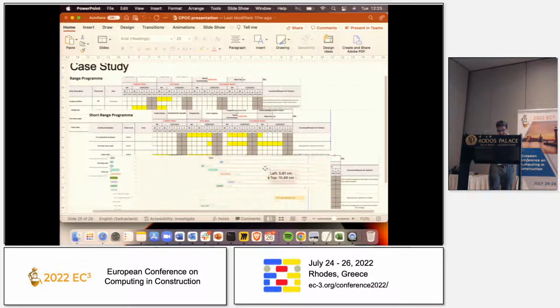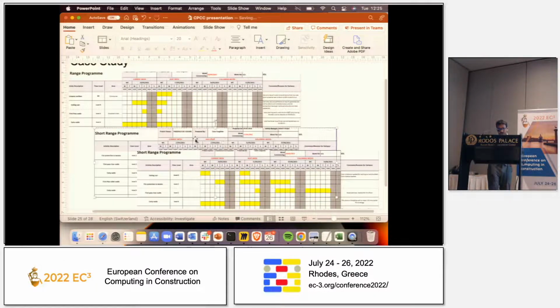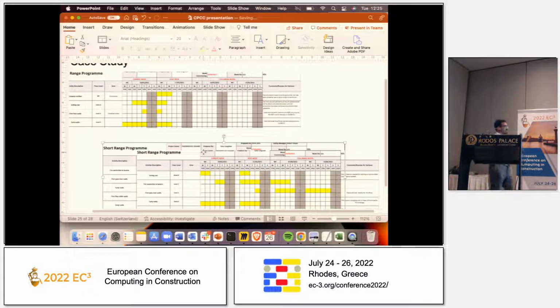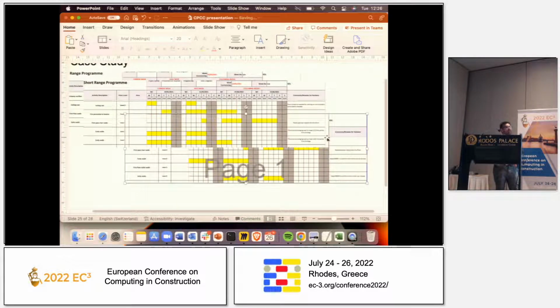I'm a bit concerned about how I could show this slide. If you see here, this is how the submittals were made with Excel sheets before. There was an activity called early walls here. It was submitted as this one, and in the next week they submitted again. It has been delayed, with the reason over here. It's blurred for a reason because we are not allowed to show it. So they submitted with a reason for it. Again, next week it got delayed, and we were not really figuring out what was happening. At that week, you would always have the reason. But at the end of the project, or one month later, when you are looking at the delays, some of these things are in different folders, and people cannot find them.